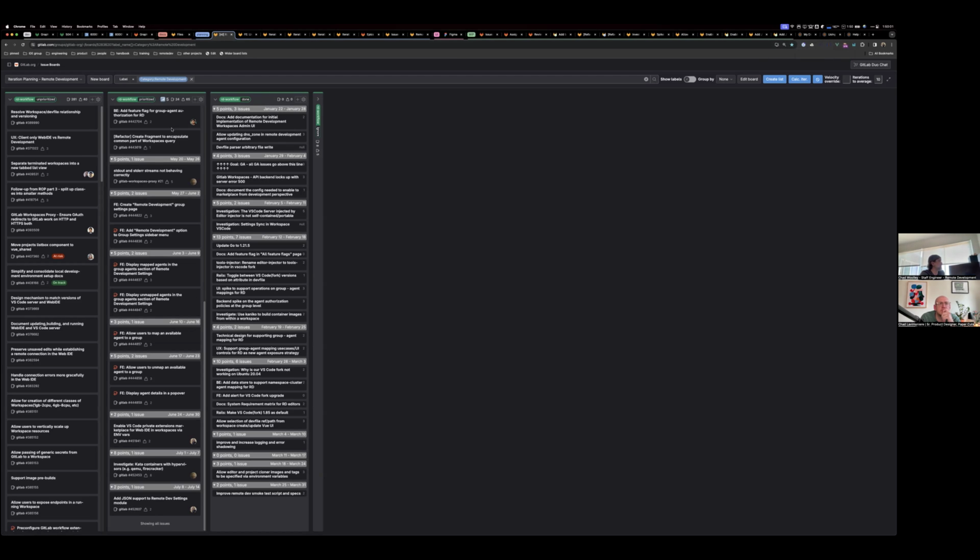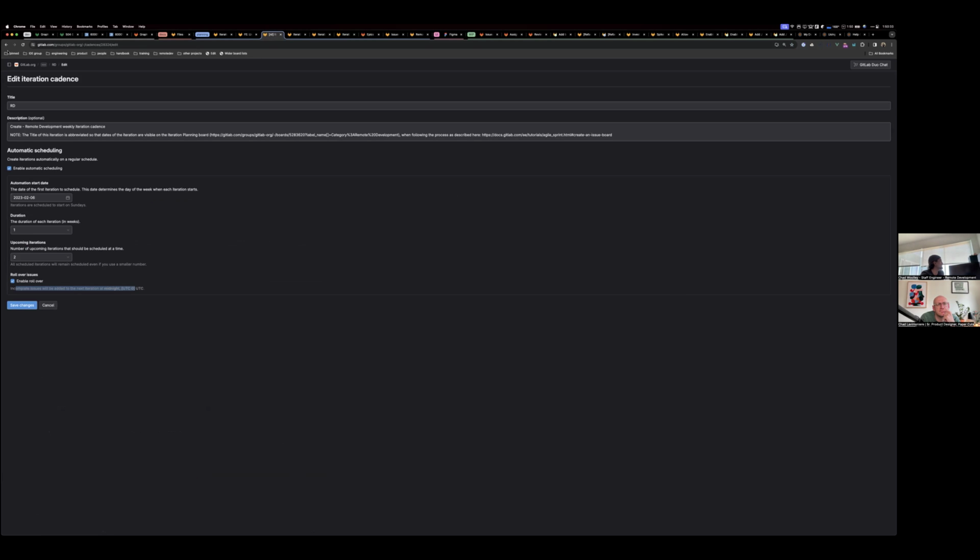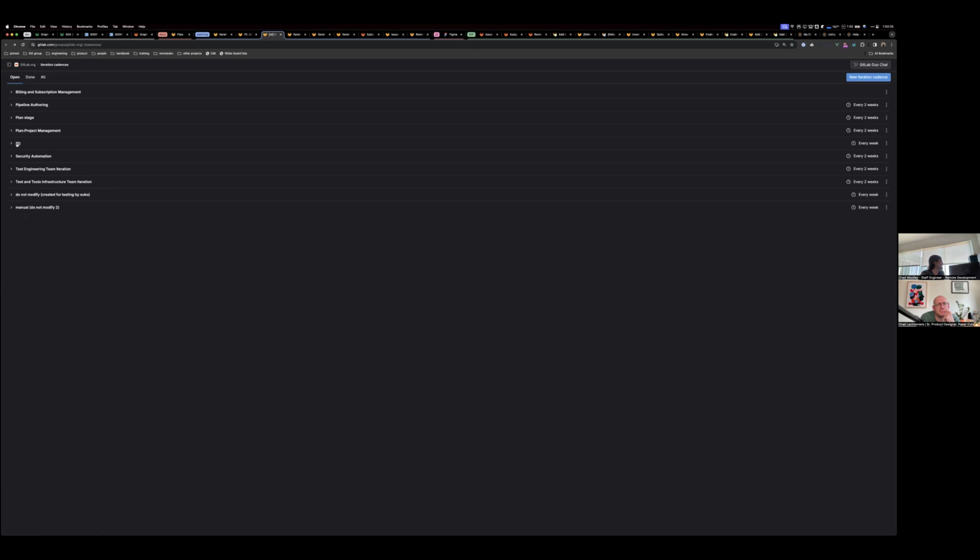Ideally the burn down and burn up chart would cover all of the past and all of the future, and also incorporate ideas of scope creep. Here's the scope that you've added over this period of time, and if you extrapolate that out, here's how much scope you're going to expect to add, which actually impacts your overall completion date for some milestone way in the future.